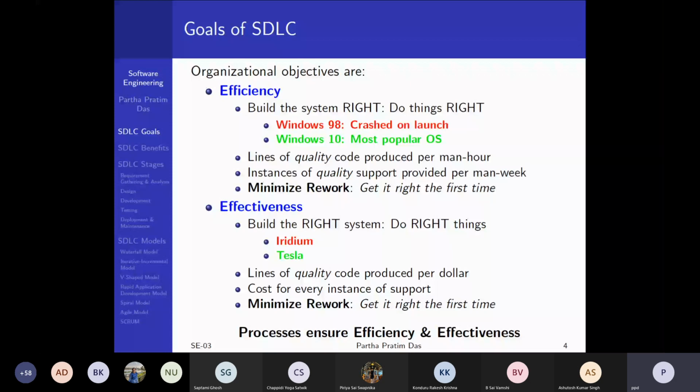But the project failed disastrously because what was not known were the requirements. When the project was implemented, it was found that very few customers actually needed a satellite phone, because all over the land, which is primarily inhabited, where humans exist, the mobile phone service itself is good enough. A satellite phone, with its cost, would not be able to compete with that. So who needs a satellite phone heavily?